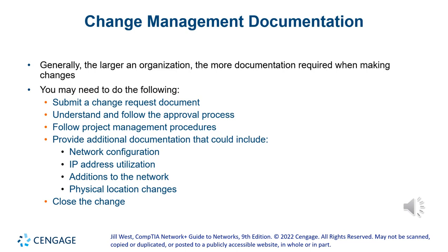The way I write my documentation is thinking that something happens to me. Let's say, God forbid, I get into an accident, or I just get sick, I don't feel well that day. I can give that documentation to any of my co-workers, and they can follow everything. They have my procedure, and it says do this, do this, do this. Install this file, which is at this location, so the file's already there. Do a backup, store the backup at this location, and so on. If something fails, the rollback procedure is this. Go to your backup that was there, name such and such, and restore it like this.